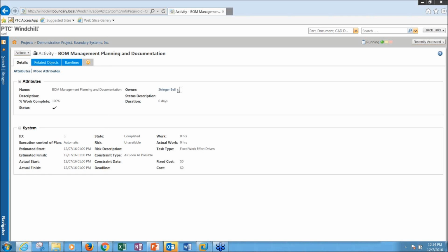They're going to have access to all of those items sort of ahead of time in order to go in and sort of build that plan out. But once I start the execution, then they lose the ability to modify those without pausing the execution. Again, difference between auto and manual execution. With manual execution, I never have to start the execution of the plan. I don't have to pause it to make changes. We're more just sort of making changes on the fly whenever we want. With auto execution, we have to sort of specifically pause, make our changes, and then restart to send those tasks back out if we've made changes to that plan.